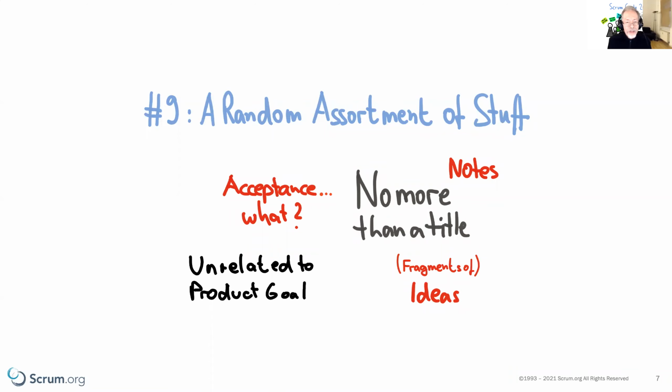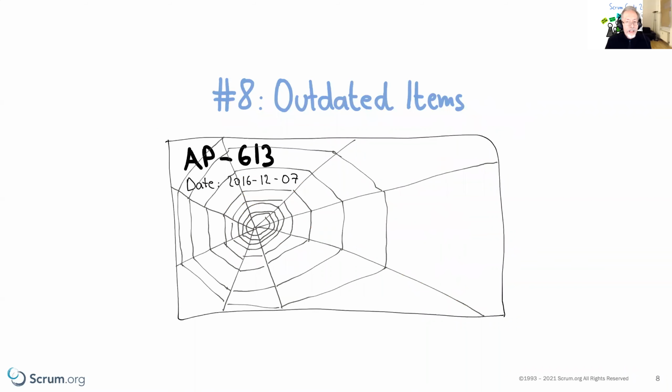So another attribute of oversized backlogs is that you'll have a lot of outdated items in them. We were talking earlier about a size of 3 to 6 sprints, so we probably talk about a horizon of 3 months, maybe 4 months. Now, if you have items in your product backlog that are older than this 3-4 months, you should really ask yourself, why are they in there? Apparently, they're not that important that they make it into a sprint planning, so why continue having them there?